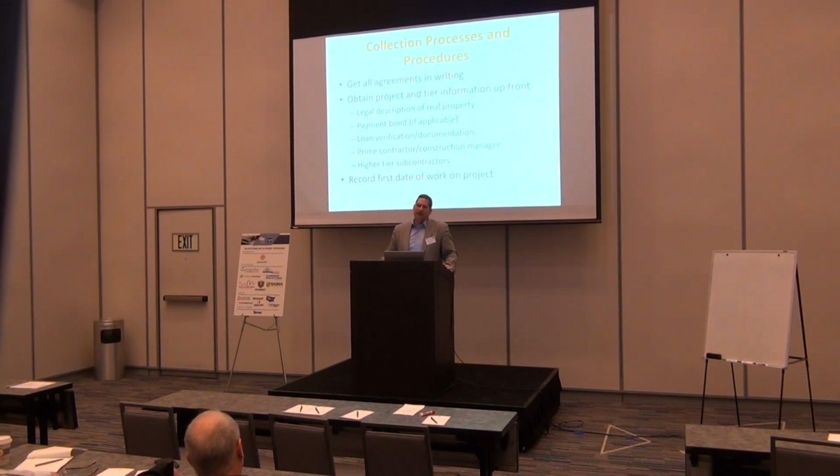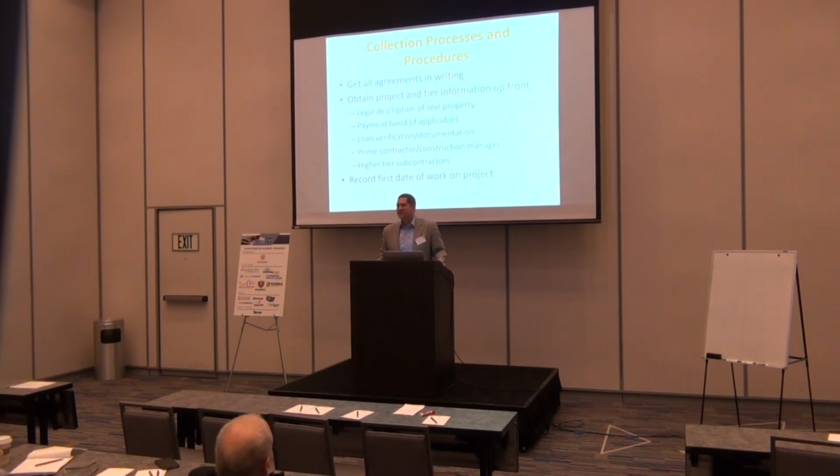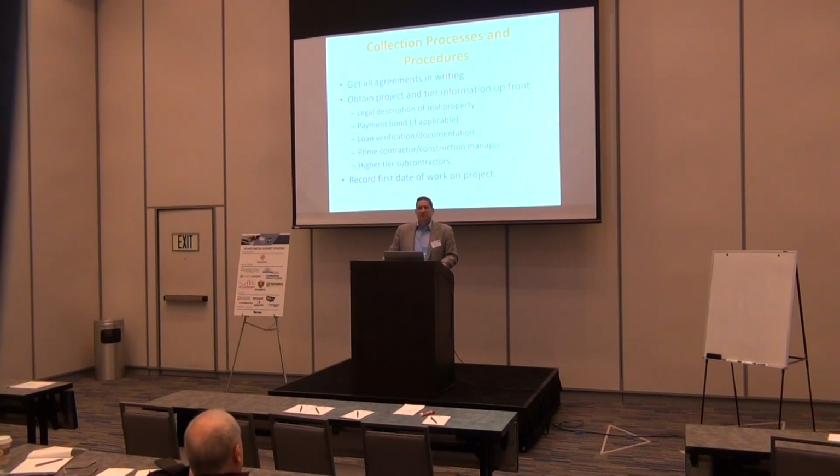And in fact, there was a project down in Plaza, the West Edge project, which ended up shutting down, and they ended up tearing down the building and building a new building there. And the judge in that case actually let it through. There was some marble from China that was very unique. It was cut specifically for that job. Got delivered, never went on site, never got installed. So there was a real question whether or not they would be able to collect as a mechanics lien claim in that case. And the judge did allow it, which was unusual.